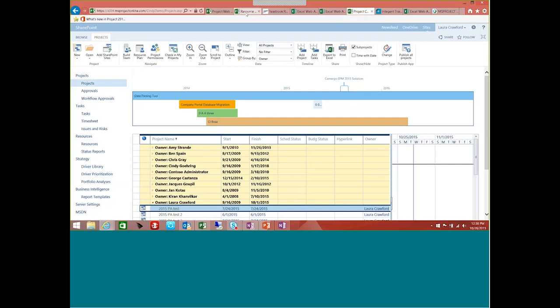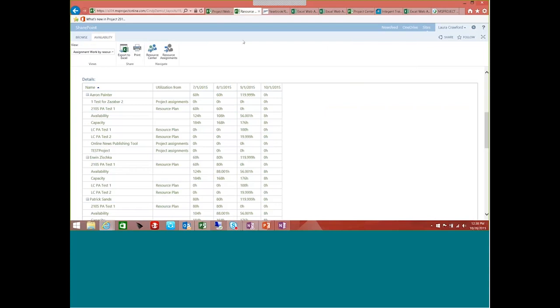What a resource plan does is it gives you the availability to plan how you're going to utilize a resource over a course of time. So resource plans are built very loosely upon an actual project plan. All right, so they are not concerned with project assignments. Resource plans can be built without even having a schedule.